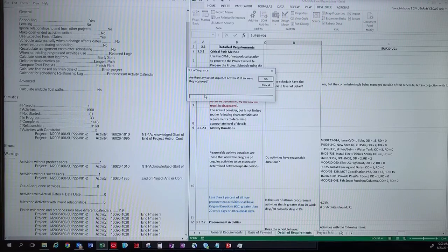So there's always add a sequence activities that are occurring, and the contractor will have to move activities around and move starts and finishes. And so yes, and it was discussed at the schedule review. Did the contractor propose logic corrections? Yes, they did. Or justify not changing prior to updating. But this is always at the schedule review. This is where they make their proposals to change, and we can say yes, no, or we have to know. They have to explain to us why they're doing certain things.